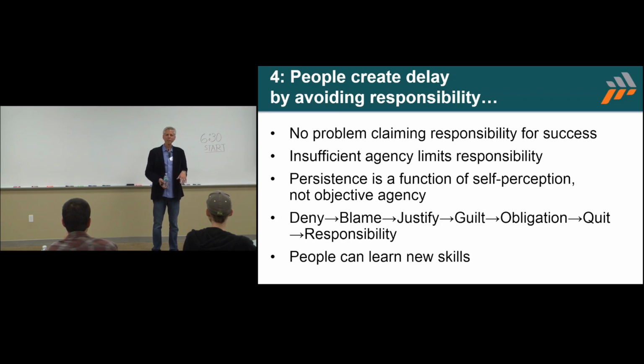If the definition of done is too ridiculous, you're going to get velocity 0 every sprint, and that's not good for anybody. So you tweak that yourself, and you are doing that. When I say a failure rate, I guess I shouldn't use that term very often. What I mean is an invalidation rate. So we believe that by beefing up our definition of ready, our velocity will go from 20 to 24.